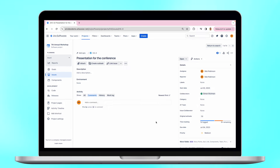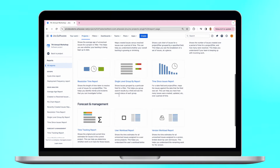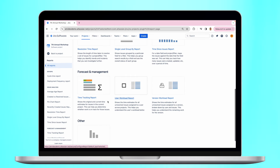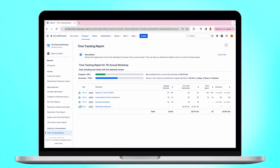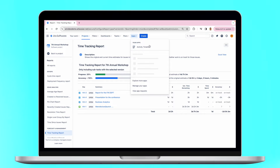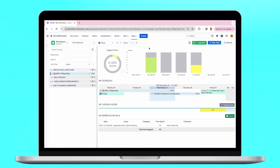After that, the following question arises: how to track this data? You may find a simple time tracking report in Jira which can be generated only for a single project in the reports section. But if you need timesheets or tracking billable or non-billable hours, you can try Jira add-ons like Activity Timeline to fill the gaps.